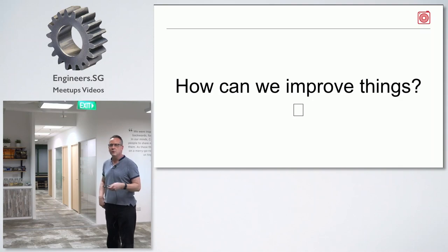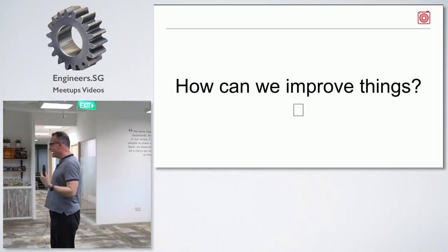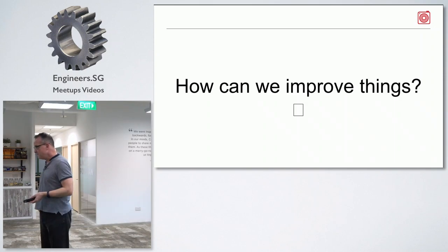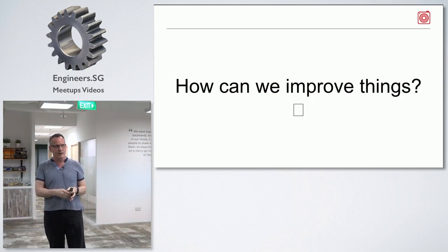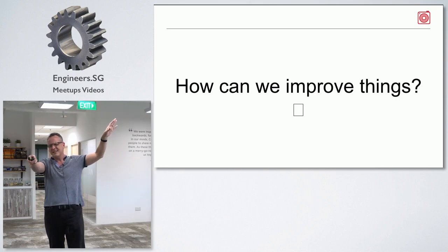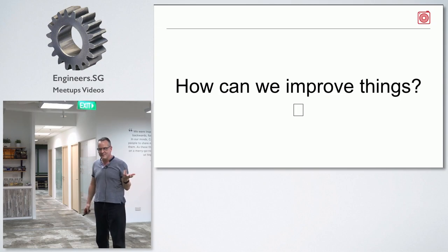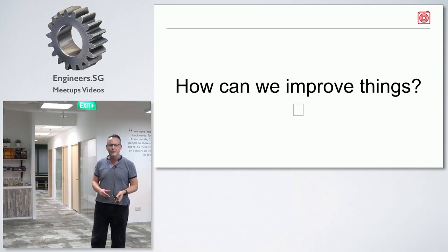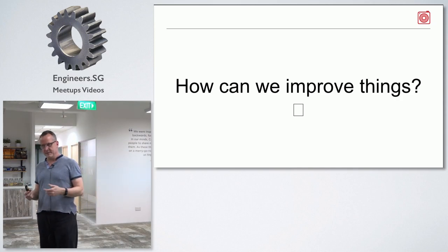once you have these up on the board, one of the things you want to do is cluster them. You want to find the related themes. So you're going to, as a team, start, oh, well, these all seem to fit here, and these seem to fit here, and these seem to fit here. Boy, there's this outlier here. God, he always has the outlier. I usually always have an outlier. That people are like, what? And then you start looking at the themes, and you start thinking about how you can address it.